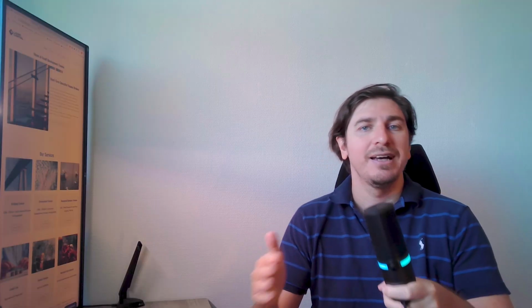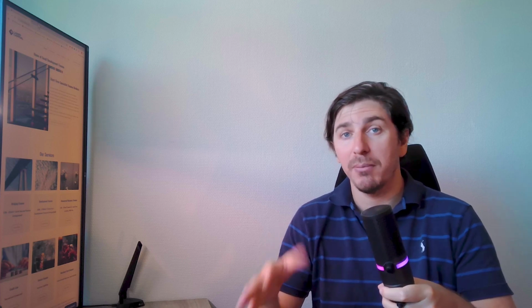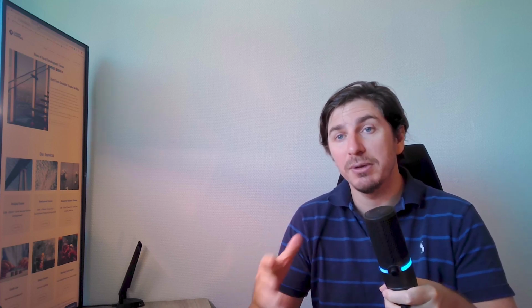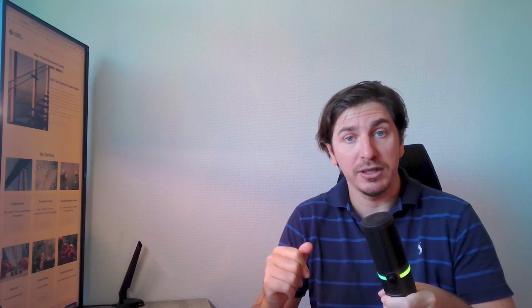An important thing when calculating your total cost or estimated cost for your project as well is to maybe build in a small buffer for finance overruns. These will be when your loan, typically a 12 months term for the bridging finance on the smaller end, runs out. If you go over that, you could fall into a default situation where you end up paying more interest for a short period of time whilst you're trying to sell the property or refinance it. It's always worth having a small buffer built in, because most lenders will charge roughly 1% per month more than the contracted rate. So it could end up doubling your rate for a month or two, which is something that you've got to keep an eye out on.